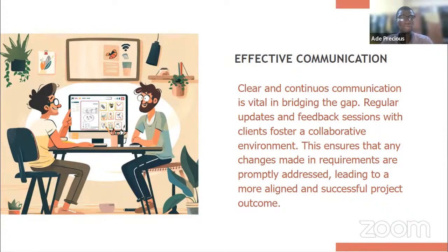And one of the best practices I've learned in terms of communication is having, for clients who are not on site, a collaborative environment probably every 2 weeks virtually, where you would bring in the client and you bring in your developers, your whole team, and you talk about the updates within that 2 weeks. So effective communication is one of the vital ways in bridging the gap.